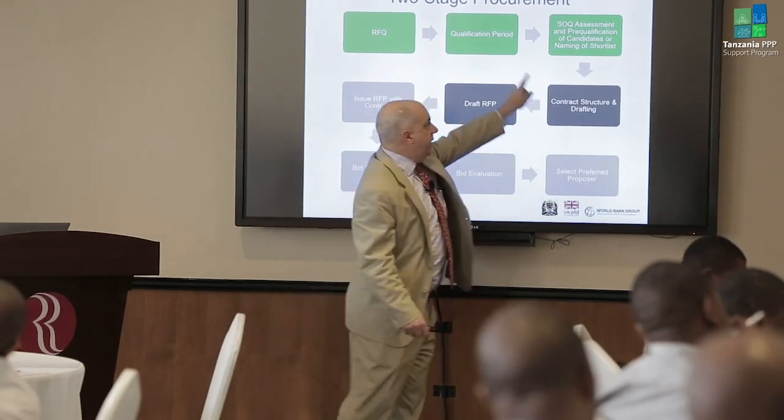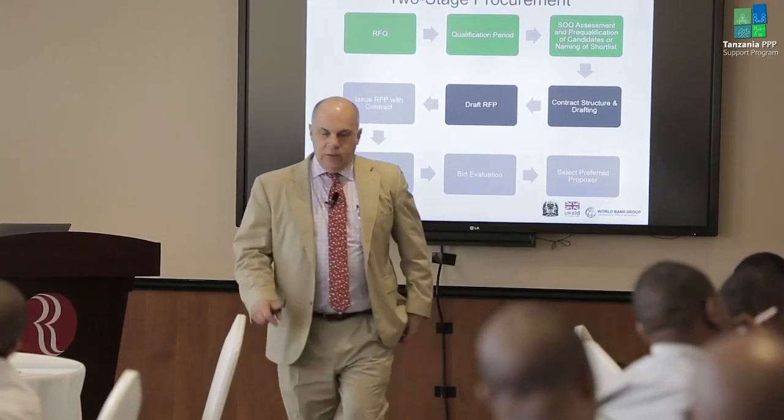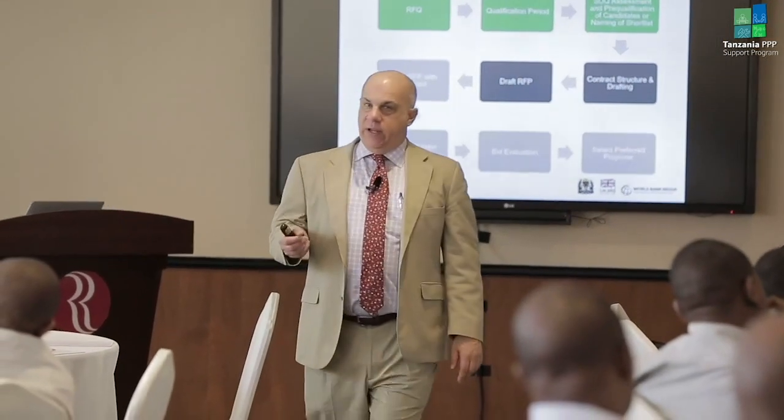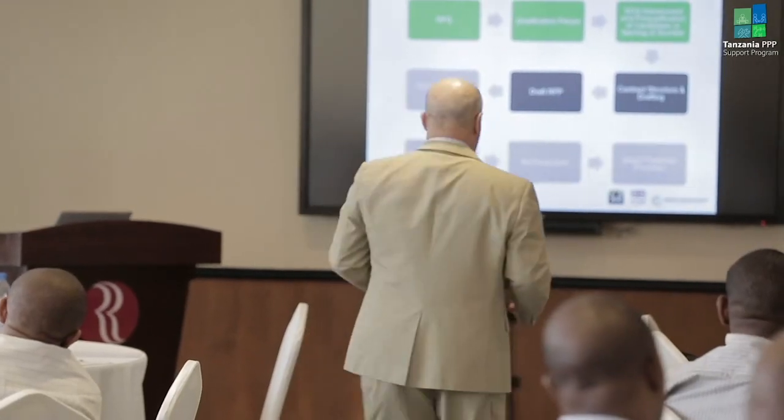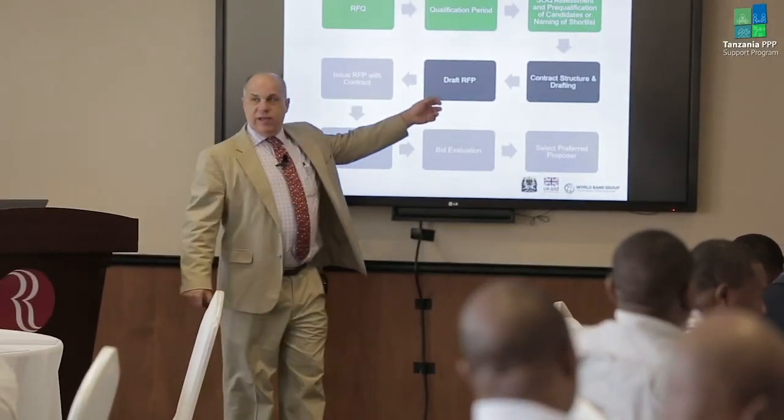One of the things that should have been happening in parallel is we should have our lawyers drafting a contract. It's going to be in draft form. And when we issue the RFP, we should issue the draft contract with the RFP. There are a lot of benefits to it. One is to avoid this drawn-out negotiation.